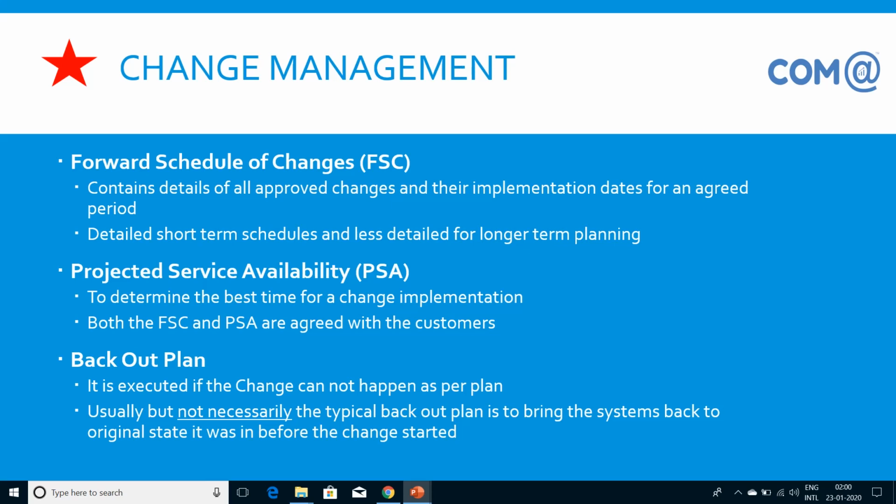In bigger organizations, they maintain a dedicated calendar, and once the change is approved by the CAB members, we have to immediately go and update the calendar with the time slot we have got approval for. This will be helpful for bigger organizations where multiple towers are implementing changes at the same time. So the network team will have different types of change, the server team will have different types of change.